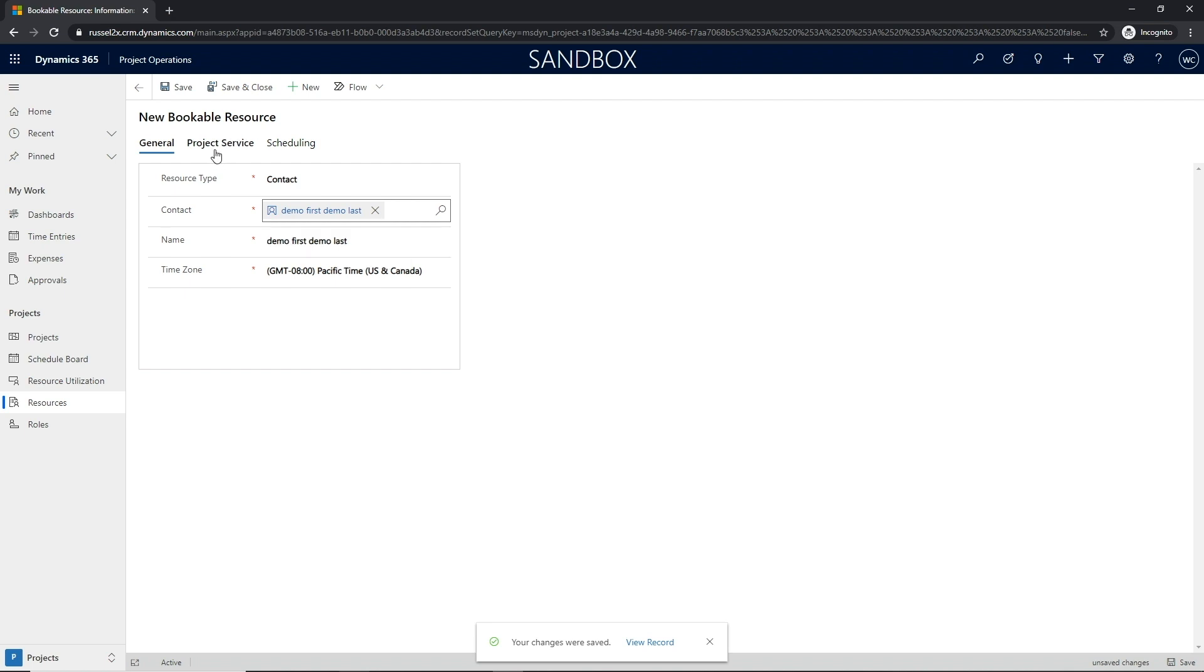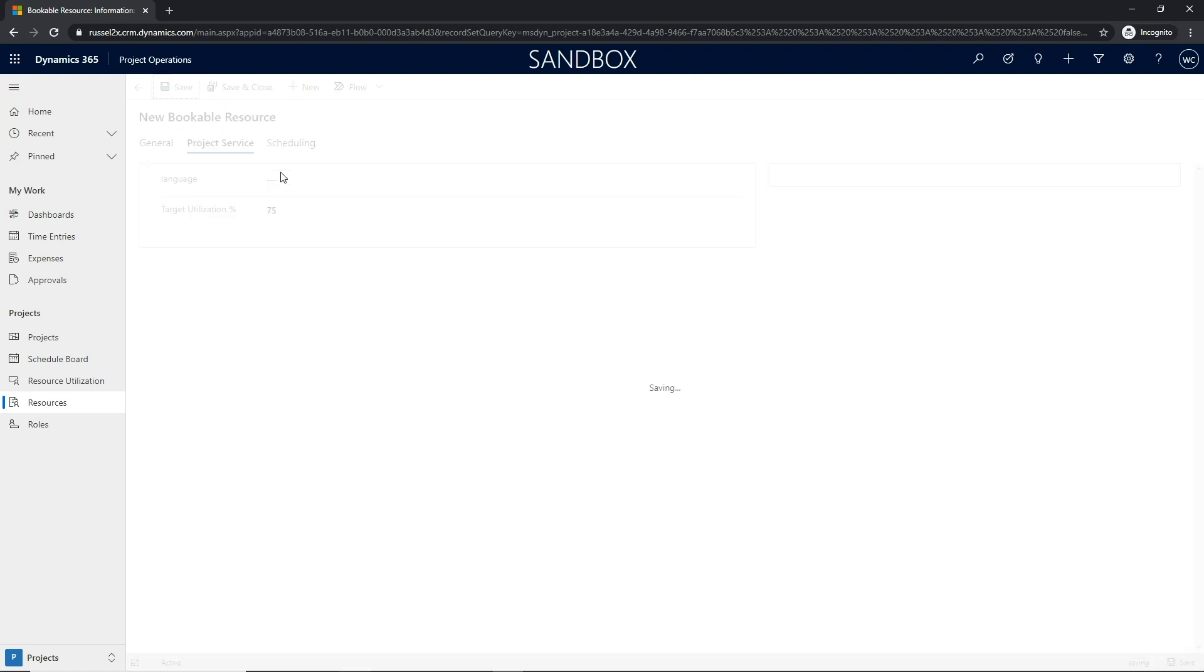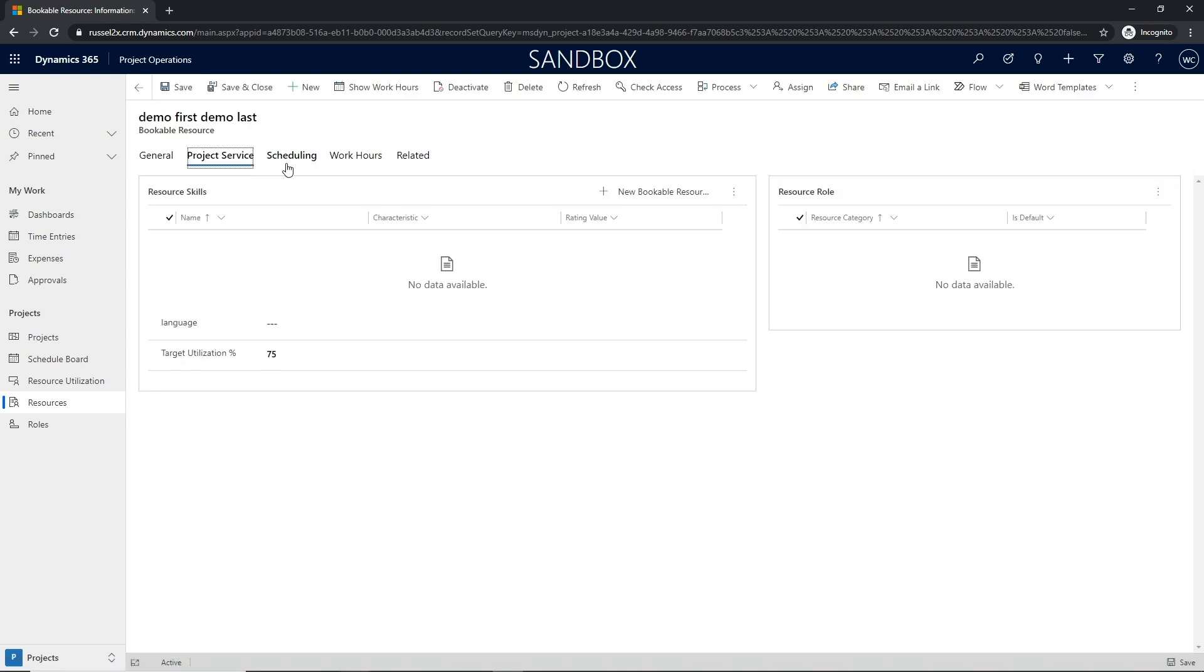Once the resource has been defined, the next step is to associate and define the level of utilization and associated roles and skills that this resource will have in the application.